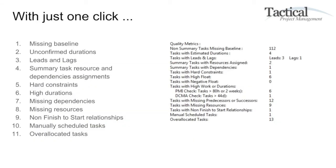With just one click, you'll find out if you're missing a baseline, if you have unconfirmed durations, if you have too many leads or lags, if you're assigning resources at the summary task level, if there are hard constraints, high durations, missing dependencies, missing resources, non-finish-to-start relationships, manually scheduled tasks, and over-allocated tasks. The power of this is it's all done with the click of a button.